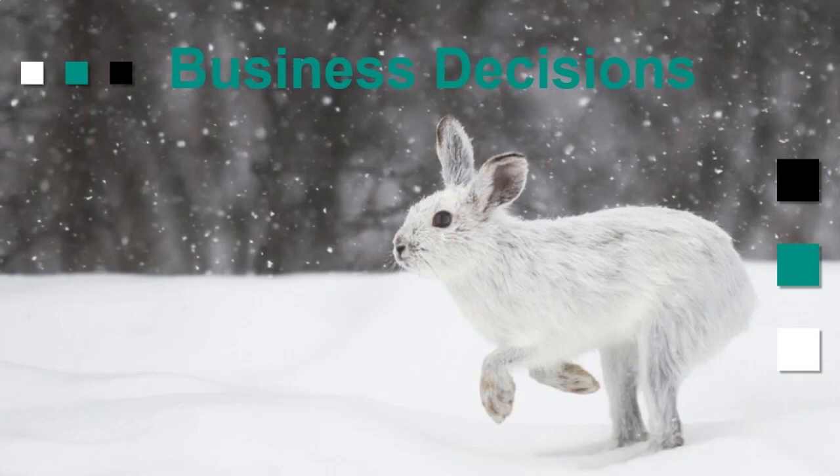And then let me ask a second question. I'll just do two right here. How often do you do reporting? Okay, so that's another thing to keep in mind. Depending on your projects, of course, it's going to vary. So if you're doing turnarounds, daily is very common. Even every shift could be what you're dealing with.